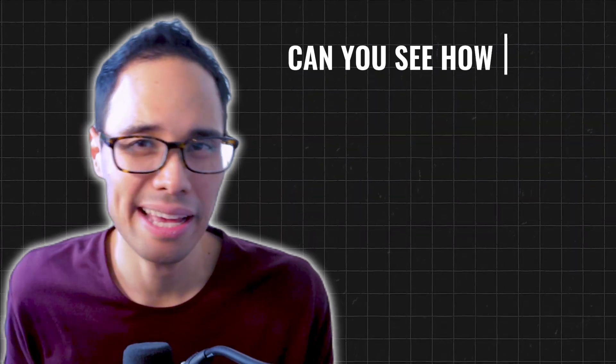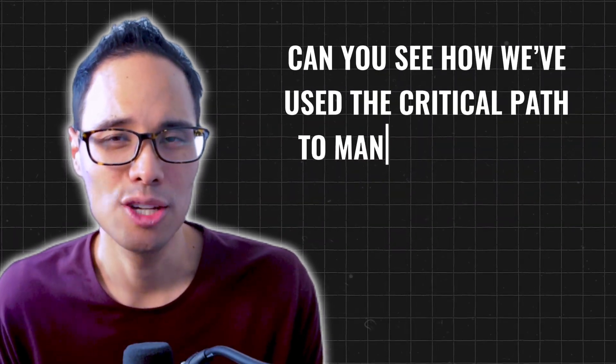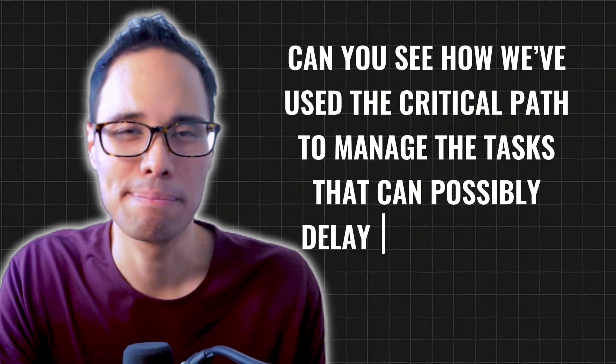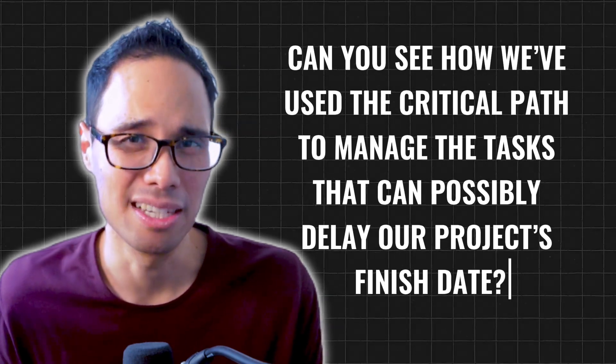So as you can see here, your critical path is dynamic and Microsoft Project will recalculate it whenever you update your project's tasks. With this example, can you see how we use the critical path to manage the tasks that can possibly delay our project's finish date? Now, we're not done yet. The best is yet to come.